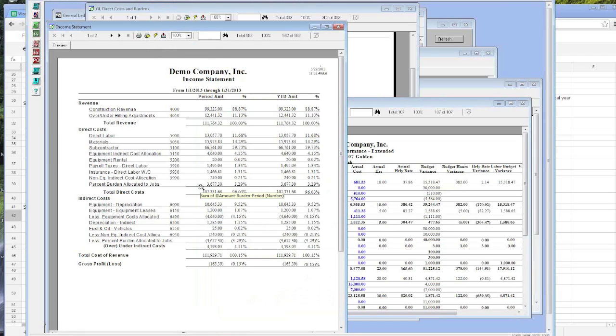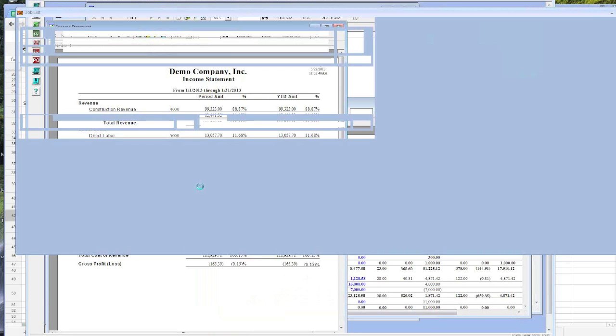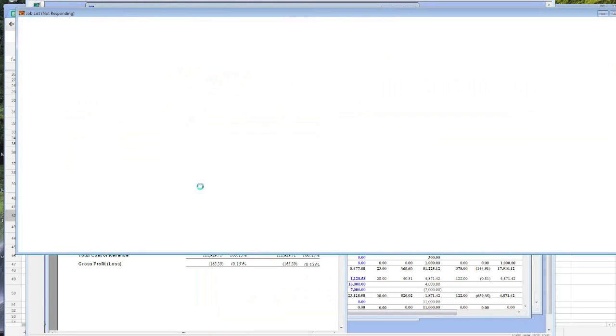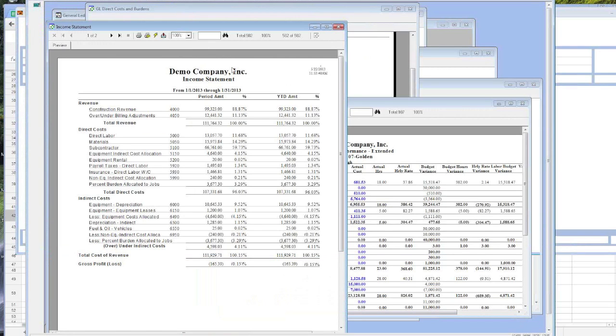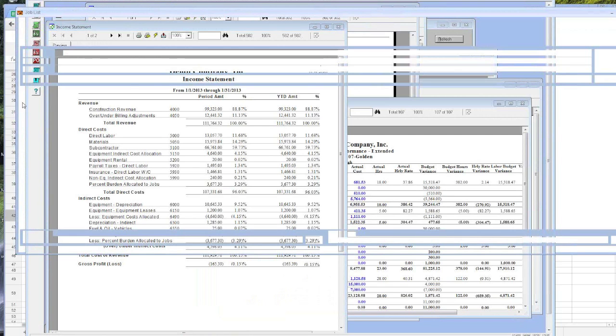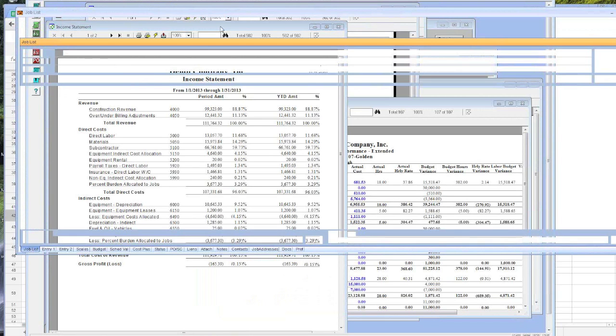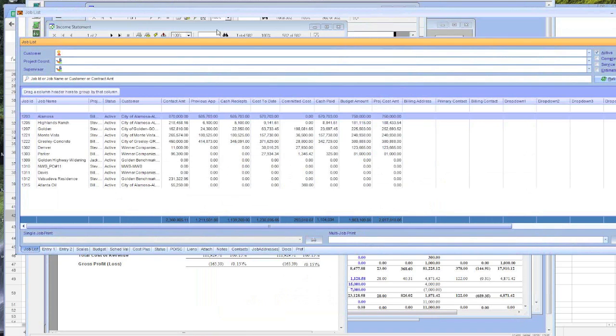There's an inherent limitation in the accounting process, in that you can't really take a skid steer and apply the exact cost of the skid steer to every project it's on. It's just not practical, and that's the definition of indirect cost. It's difficult or impractical to apply directly to jobs. So you want to apply as much as you possibly can directly to your jobs, because that makes it easy. But the indirect costs have to be considered. So we brought up this .NET grid, and I'm sorry for this computer running so slow.